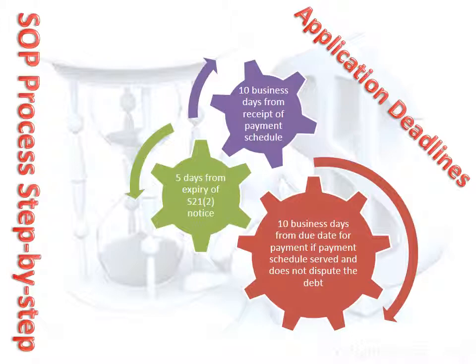Failure to comply with the timeline will extinguish the claimant's right to go to adjudication on that payment claim. It may be possible to include the amount of that payment claim in a future payment claim, but this will depend on the circumstances of the particular case.